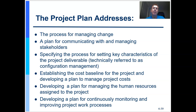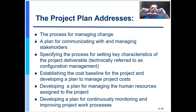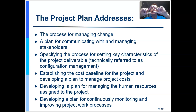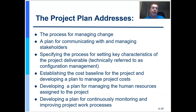To make your project plan work, you're concerned with the iron triangle — the triple constraint: scope, schedule, and cost. You want to set them, define them, have people accept them, and then drive towards them. If you make an adjustment to any one of them, it will impact the other two, absolutely. So you want to manage your baseline. You'll spend the rest of your life communicating and making trade-offs in that baseline.